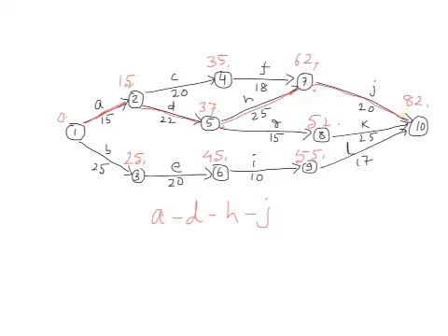If you increase the time on B by 7 days, then we can easily observe that here 25 is now 32. So on node 3 the earliest time becomes 32, plus 20 it becomes 52, plus 10 that is 62, and plus 17 it is still 79, which is lesser than 82.